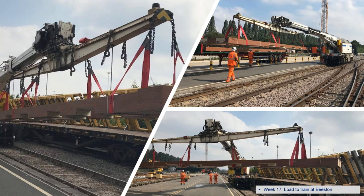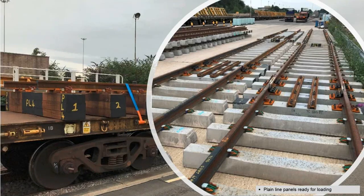One thing that was a problem in terms of looking at this lift itself: you've got two beams together, so the T pieces at the end are clearly holding those two beams apart, but because of the way the straps have gone around the beams, you're at risk of squeezing the whole structure together, which might cause some damage. So a T-piece was built out of some timber to use as a spacer to sit on top of the beams as they were lifted, to make sure they weren't squeezed together and damaged, and to avoid causing problems dimensionally when it came to reassembling it.